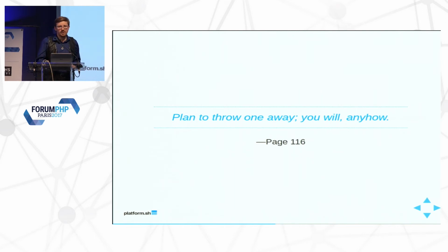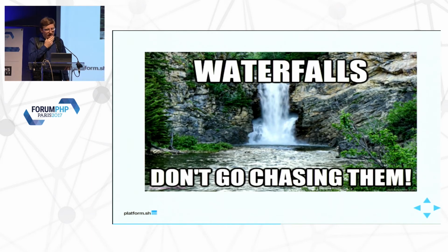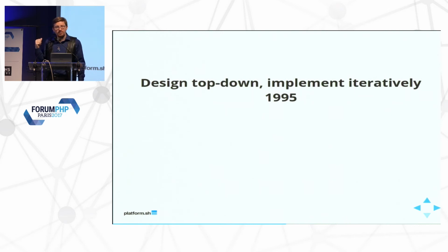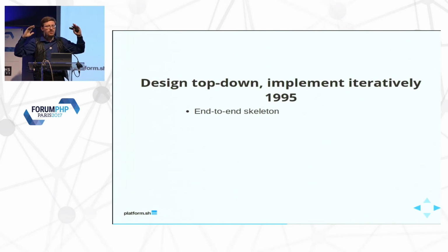Now, at this point, someone in the room is probably about to say, but Larry, you're talking about waterfall development. Isn't that terrible? Aren't we supposed to do Agile these days? Well, kind of. In Brooks's follow-up edition in 95, he says, yeah, that does sound kind of waterfall-y now that you mention it. So let's revise it. Not throw it away, but revise it. Start by building an end-to-end skeleton of the system, your high-level architecture with pieces stubbed out.